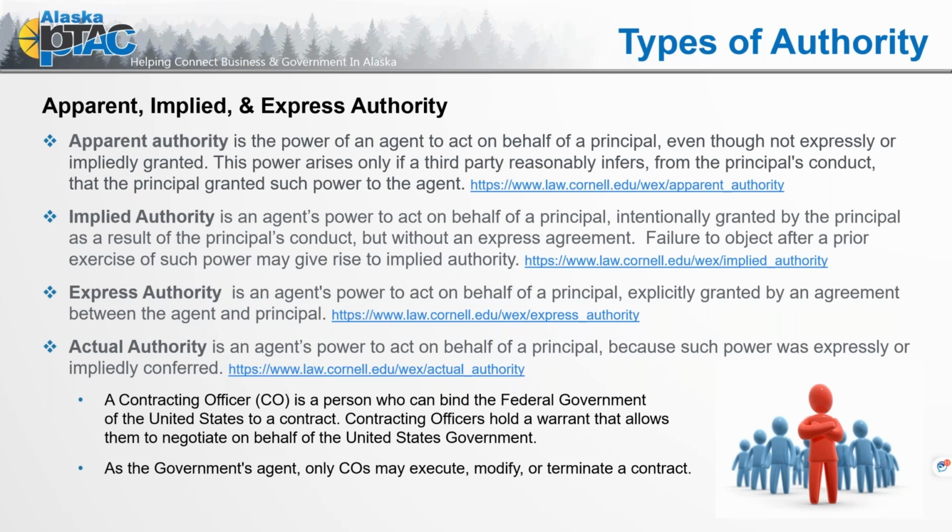And if this becomes an issue, this is worth tracking, whether you're on a construction site and you do daily note logs, or just through the performance of the contract, where you then start conversing with your COR and your contracting officer to make sure that there is no confusion in direction of orders, that you or your staff are not being directed to do work outside the contract scope because of that confusion of authority.